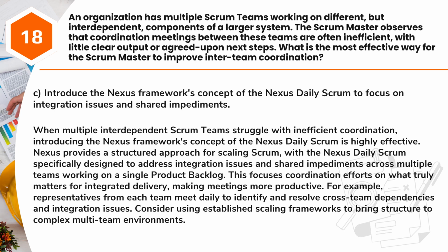Answer: C. Introduce the Nexus Framework's concept of the Nexus Daily Scrum to focus on integration issues and shared impediments. When multiple interdependent Scrum teams struggle with inefficient coordination, introducing the Nexus Framework's concept of the Nexus Daily Scrum is highly effective. Nexus provides a structured approach for scaling Scrum, with the Nexus Daily Scrum specifically designed to address integration issues and shared impediments across multiple teams working on a single product backlog.